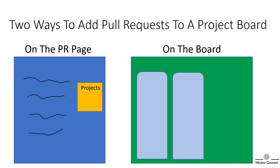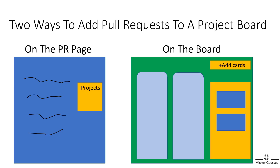The second way you can add a pull request to a board is from the board itself. At the top right of the board is an Add Cards button. Clicking this button will open a fly-out window with all the pull requests that are in repositories connected to this board. You can filter the results to find the pull request you need, then add them to the board either by dragging and dropping or using keyboard shortcuts.